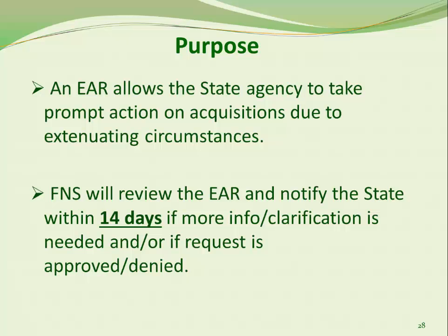An EAR allows a state to take prompt action on acquisition that under normal circumstances would be approved under IAPD timeframes, but due to extenuating circumstances, it requires immediate action. Rather than using the 60-day timeframe, FNS will review an EAR within 14 days.